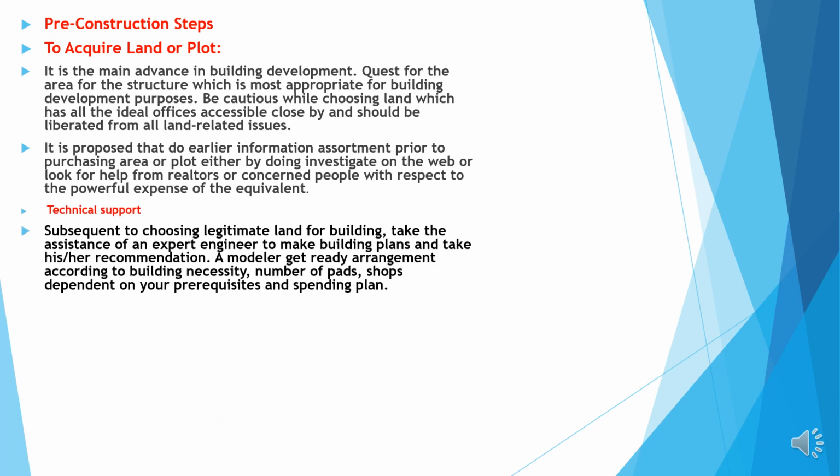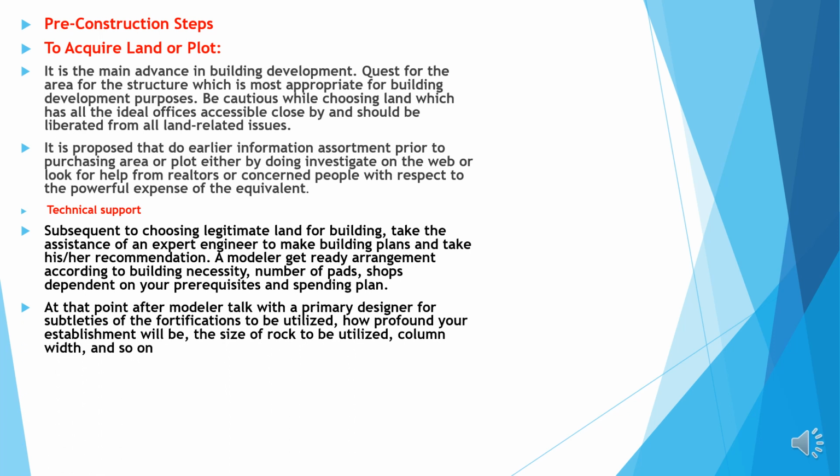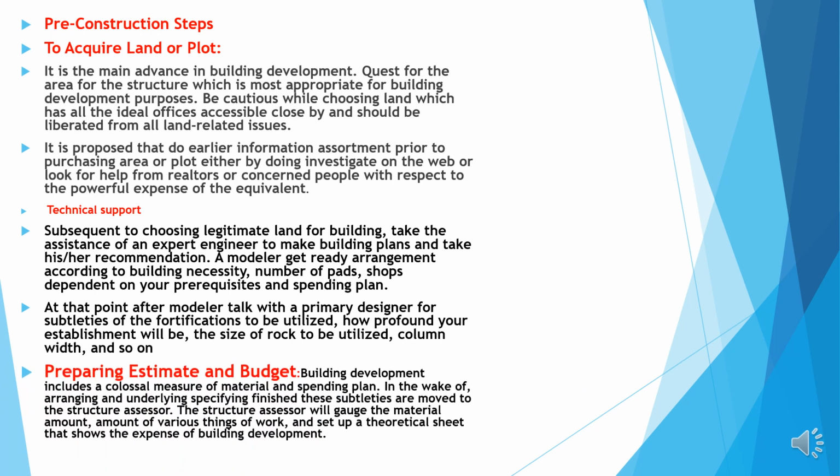Technical support. Subsequent to choosing the legitimate land for a building, take the assistance of an expert engineer to make building plans and take his recommendation. An architect prepares the plan according to the building requirement. The number of bedrooms and shops depend upon your requirement and budget. After that, the architect talks with a structural designer for details of the reinforcements to be utilized, how deep your foundation will be, the size of the rock to be utilized, column width, and so on.